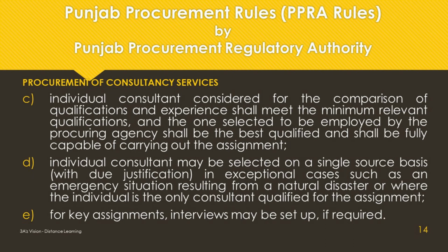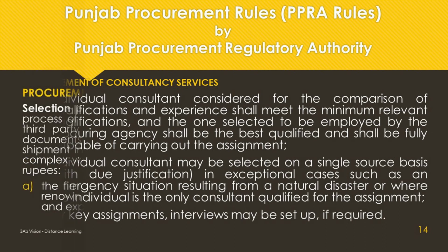and the one selected to be employed by the procuring agency shall be the best qualified and shall be fully capable of carrying out the assignment. Individual consultant may be selected on a single source basis, with due justification, in exceptional cases, such as an emergency situation resulting from a natural disaster, or where the individual is the only consultant qualified for the assignment. For key assignments, interviews may be set up, if required.